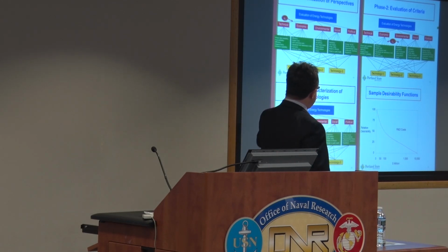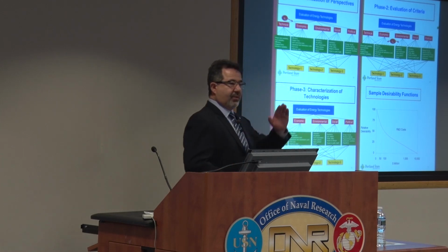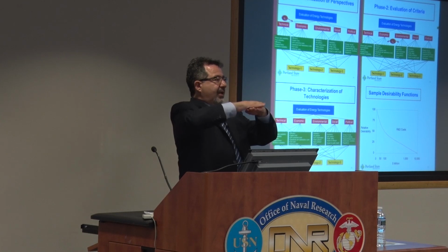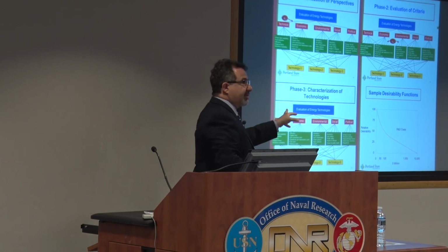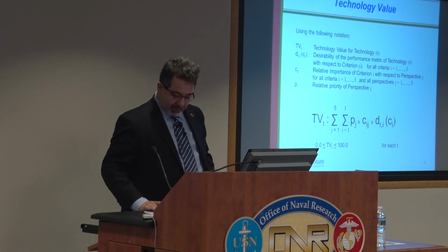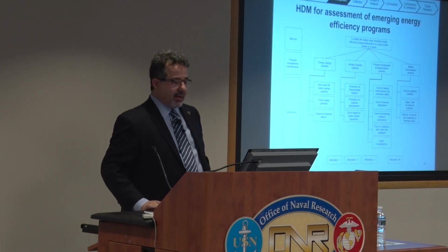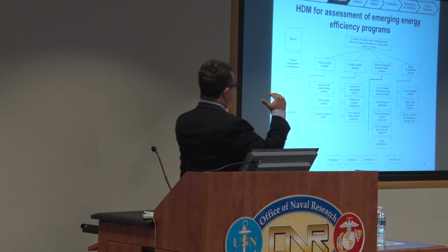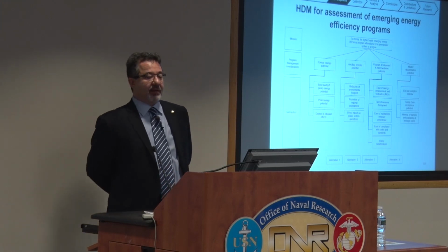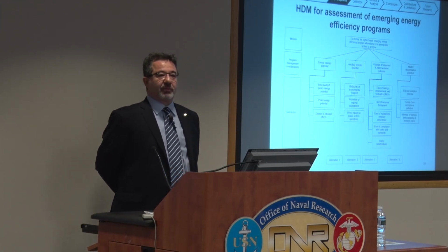So similarly, for some of the metrics, after a certain level, it doesn't matter if it keeps increasing. We are satisfied at one level. So these value curves help us to identify that. And then we put it all together and come up with technology value. Now, we applied this approach at different levels in different areas. One of them was, again, for our region, looking at energy efficiency programs to prioritize them.